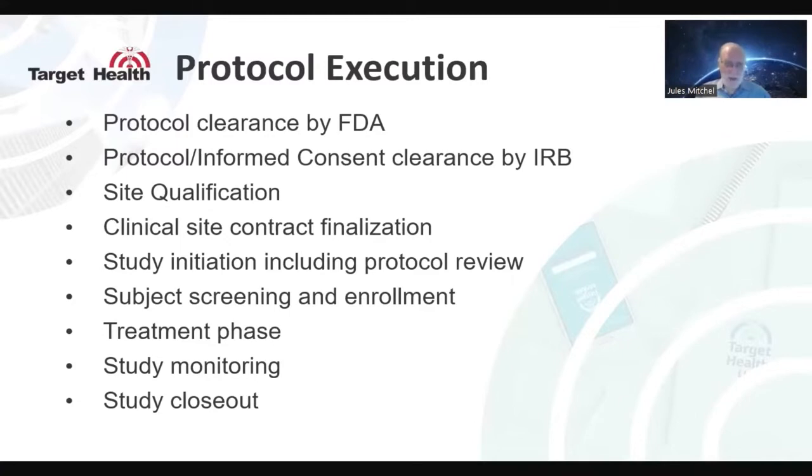And then we screen the subjects and we enroll them, okay? Then we have a treatment phase where we go through the whole process of treating. And there's where the ECRF and remote monitoring becomes very important. And the more we can get the data entered in real time, the better it is. And then we can monitor in real time, we can monitor remotely. And if we enter data in real time, we don't have to worry about source document verification, which is a thing of the past. And then we eventually close out the study and write the study report.